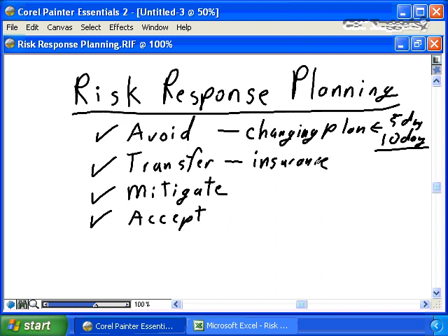If there is a risk that your project is going to be impacted by weather, if you live in an unstable climate where there is a risk of fires, floods, earthquakes, you may want to take out insurance that is going to insure both your property and provide some financial recovery should your project be impacted by insured events. So effectively, by taking out insurance, you are transferring the risk of environmental impacts on your project and getting insurance that will cover the risk event and ensure that your project is able to complete with no true impact to the organization.